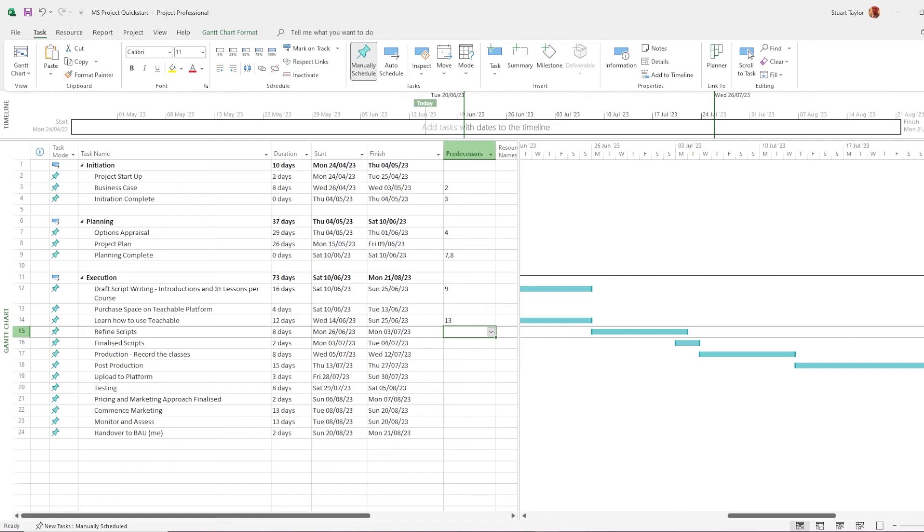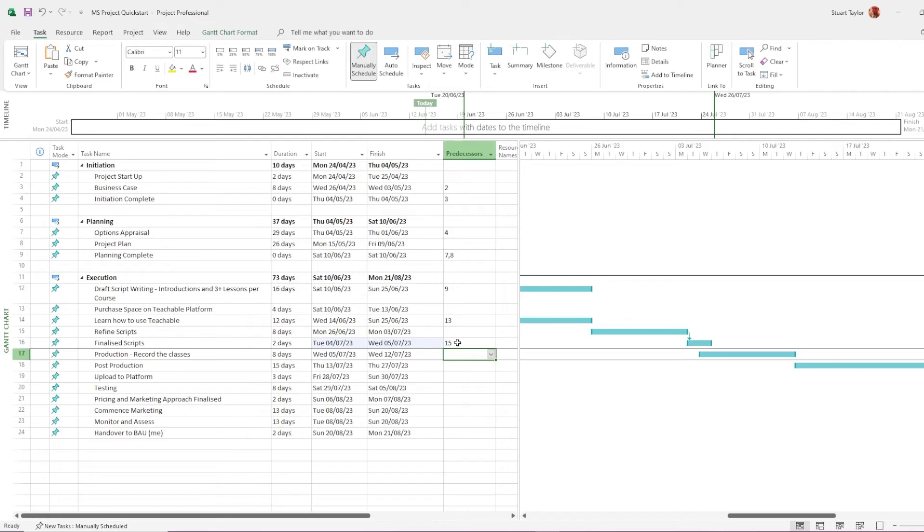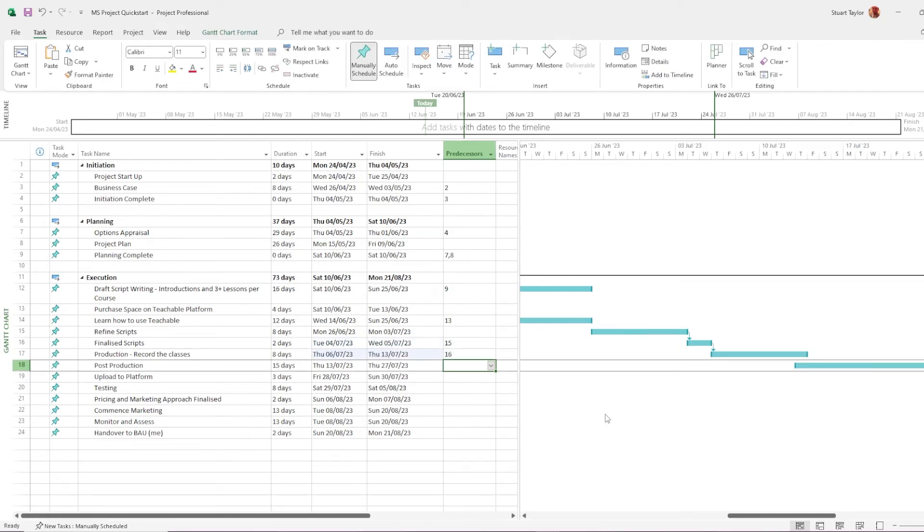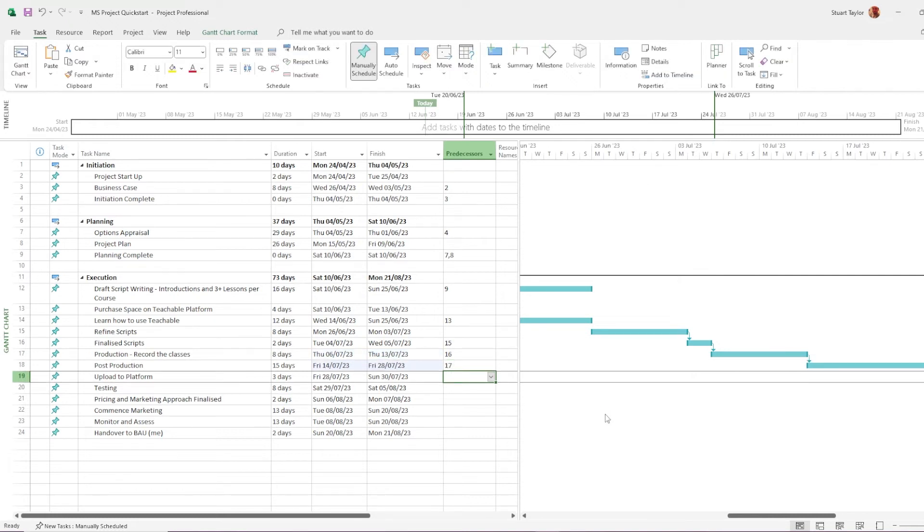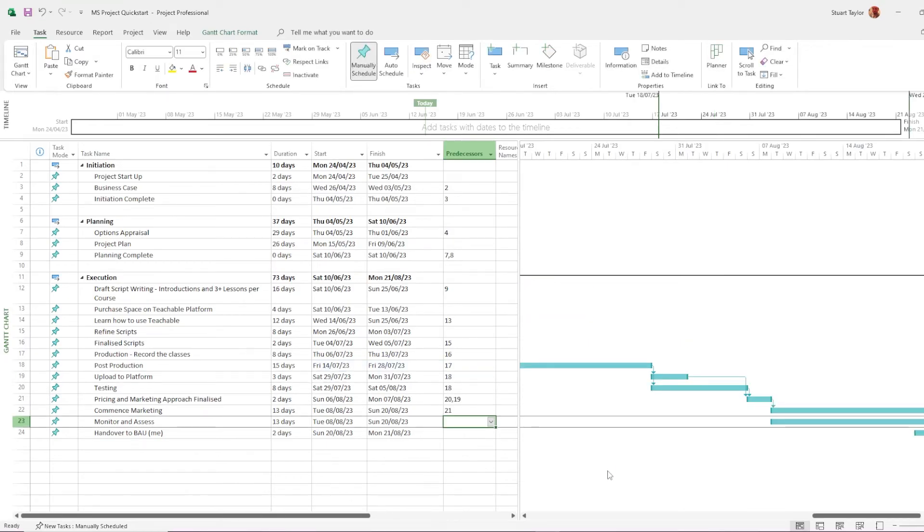Okay. I'm jumping ahead a little bit now and I'm including the execution stage. I've already copied this across from my Excel document. The reason I left this on manually schedule is because I knew I was going to be copying and pasting dates across from Excel. I promise we'll look at all of that in a future video. But if you already have dates in mind for exactly when things are going to happen, keep it to manually schedule.